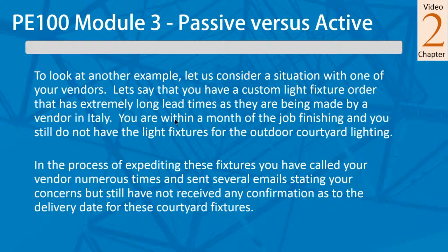So you're getting non-answers. You're getting passive answers from the vendors, because the vendors are only passing on what they get told. They're about as passive as you get. And so you need to really watch your vendor correspondence, because they're never going to give you a true answer unless you get it straight from who they're buying that product from. So a lot of times I don't consider a vendor a proper person to ask when it's going to ship. I want something directly in writing from the manufacturer. So that's one of those things you need to pay good attention to.